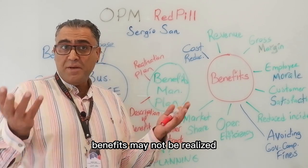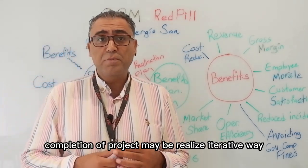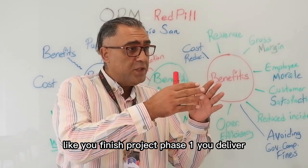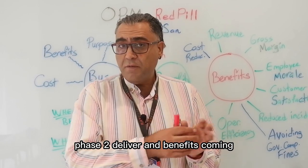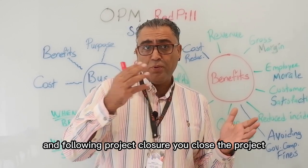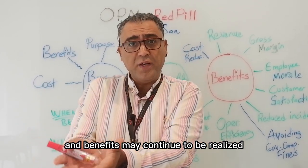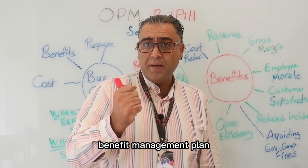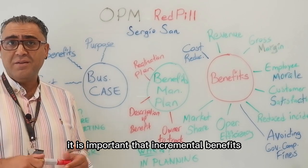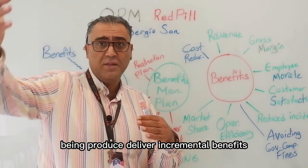Benefits may not be realized until completion of the project — you need to deliver, you need to finish the project first. Maybe they are realized in an iterative way: you finish phase one, deliver, phase two delivers, and benefits come — you can see them iteratively. And following project closure, benefits may continue to be realized. The benefit management plan helps to track benefits realization milestones and incremental benefits being produced.